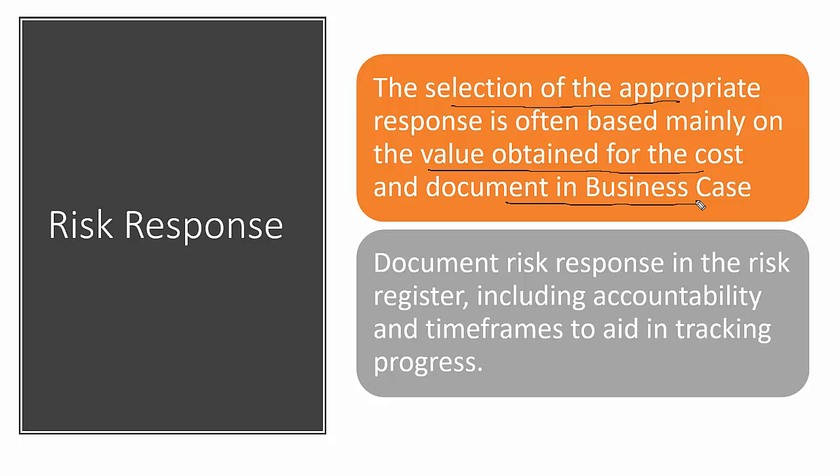For example, we have understood there are a lot of virus and cyber security incidents happening in the data center. So I submit the business case for the need of a SIEM and incident management team. Always remember one thing: whenever you submit any kind of need for a solution, your why should be clear, because management always asks for the why. And that is submitted in the business case. It is not something you randomly implement. Even in the risk register, you are giving an action plan, countermeasure details and everything. But when you submit to the management, you need to submit the business case. So whenever you select a response, make sure it is mapped with the cost and documented in the business case. Second most important thing, you need to document all the risk responses in the risk register.